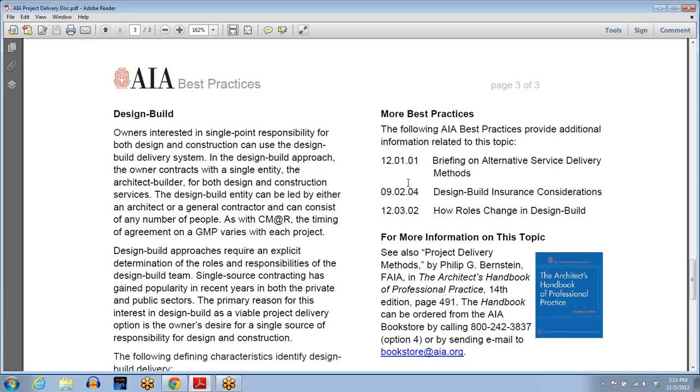contract with you, and the construction manager goes with the architect and under a separate contract with you, the church, and they design the building. Architect designs it. The builder helps, puts his eyeballs on it, brings cost estimating and design ideas to the table, and then they bid it out to subcontractors, because the construction manager is managing it in behalf of the church, and he can either hold the contracts or the church holds it, and you build the building.